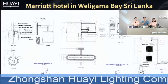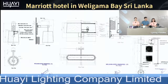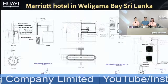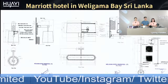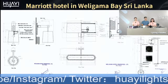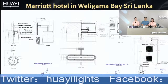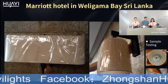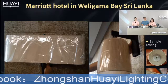Welcome. So how about the mock-up? Have you made it? Mock-up is always important. Don't imagine the client will release the order even if you already have the approval. Mock-up approval is the key, because even when we get common agreement on the drawing, the size situation is always changing. Okay, reasonable. And my experience is that sometimes the mock-up needs to be repeatedly submitted.